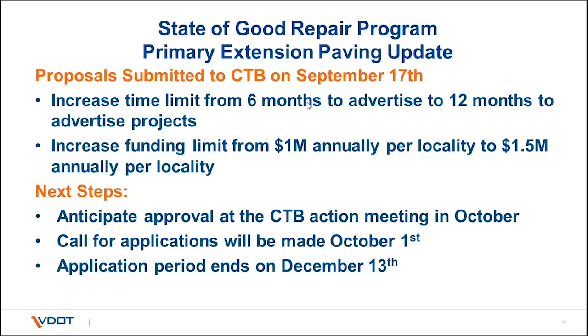But the one thing that I made mention of in the stakeholders group was we procure probably 98%, 99% of our paving, we procure federal aid. Even if we don't have federal money, we're doing it just in case we get federal monies and we can flip the switch. The other 1% we do with state funds that don't require the federal dollars, and the reality is we don't see a price difference.